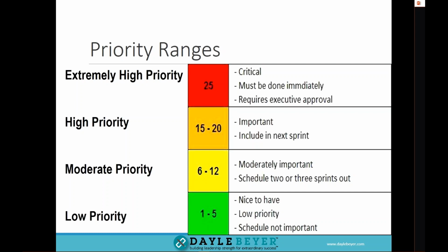The fact is the system makes it predictable, and the 10 minutes it takes to learn and implement will be recouped in your first sprint planning session. The way to approach this is to leave a space in the upper right-hand corner of your story cards. In that corner, you write down 3 numbers representing urgency, business value, and priority, always in that order.